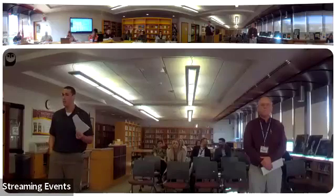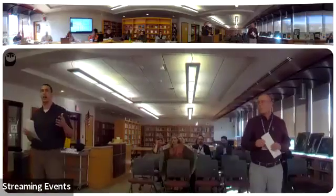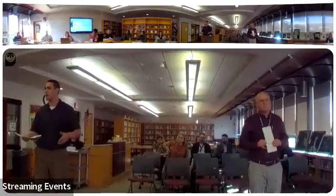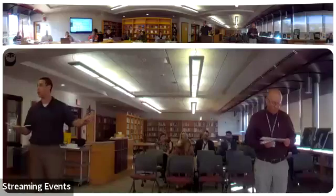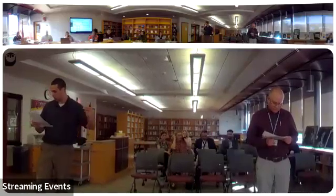And then punch list, there has been some movement on the punch list items. The commissioning agent came out a month ago or so and did a progress inspection, and a number of items came out of that. We put those under the punch list because in Procore we can track it really well with the contractors. So that's why the number of total items jumped up a bit.